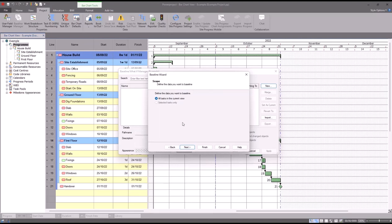So you've still got Power Project open, but it's completely lost connection to that file data. If you've not got a completely stable location to that folder or to that file rather, I would recommend against embedding baseline data.